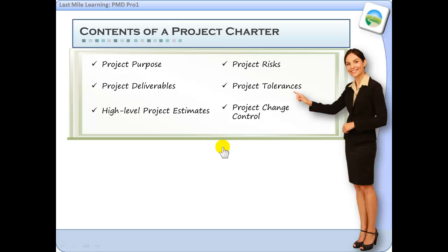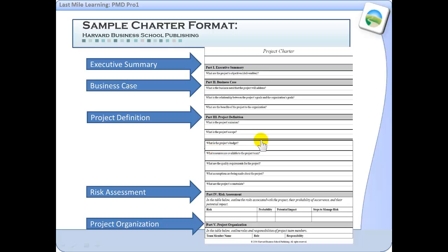The project charter is actually a document that's quite short, maybe only 2, 3, 4, or 5 pages, that gives the operating details, and it's a document that can be shared with others. It's not the same as a memorandum of agreement or a memorandum of understanding or the award letter. So just make sure that you understand those differences.